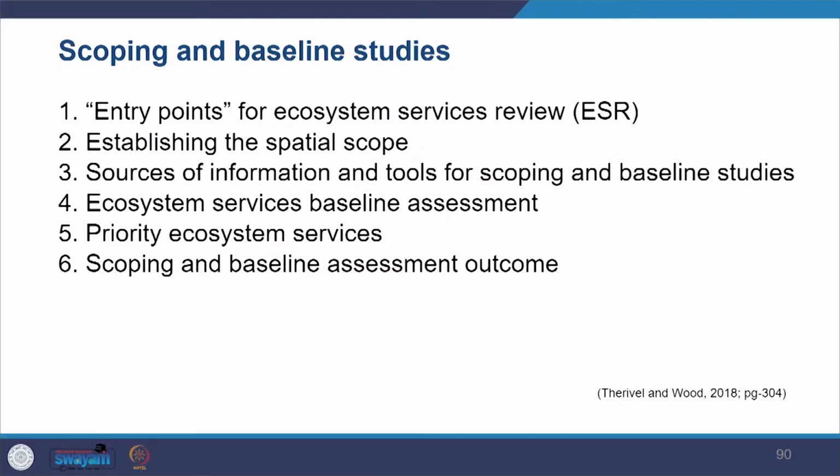It is important for you to revisit scoping and the baseline as more information is known about the project, its potential impacts, the affected people, and the dependence on ecosystem for their well-being. So, as more and more you understand about these things, impacts about the people, about the dependence, about their well-being, you need to revisit the scoping and the baseline. So, we have completed this section.